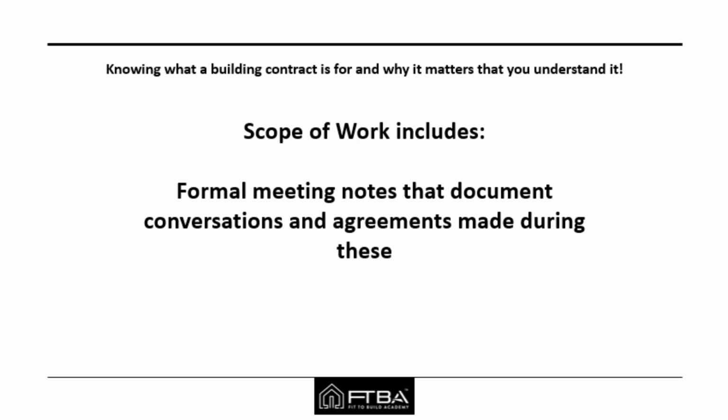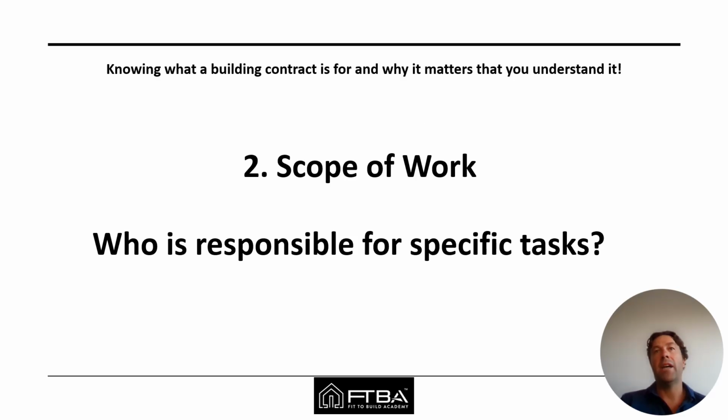These meetings can include a lot of discussion where parties say, look, sure, I can include that in the price, no worries. But it is not officially in the written tender document. I have found that this is very useful when a builder wants a job. They often have a throwaway comment in these meetings, and you as a client can actually place a lot of weight on those comments. So if you don't include written notes in regard to that, well then it's clearly not going to be included in the contract no matter what they said in these meetings.